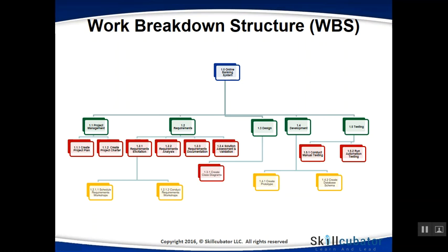Now let's see the work breakdown structure, WBS. Now the concept is the same, but instead of product, I'm dealing with the project here. So the same online banking system, but now I'm not concerned with the features or the requirements. I'm more concerned with what activities will be done as part of the project of building the online banking system. What will be the deliverables I need to deliver to the client to complete the project successfully.